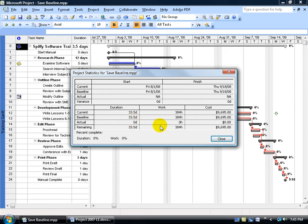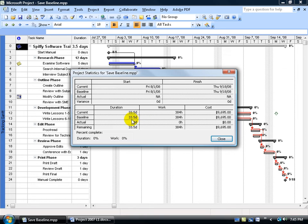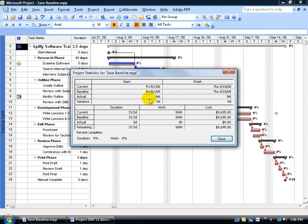Now, why is the baseline the same as the current and the remaining? Because we just saved it now, and so any changes we make here on out, the baseline will always be the same, but then as we mess around, the work may go up or it may go down in hours, the cost will go up and down, and we can compare that against the baseline here. And of course, the actuals here are not applicable because when we saved the baseline we didn't enter in any of the actual work that was done.